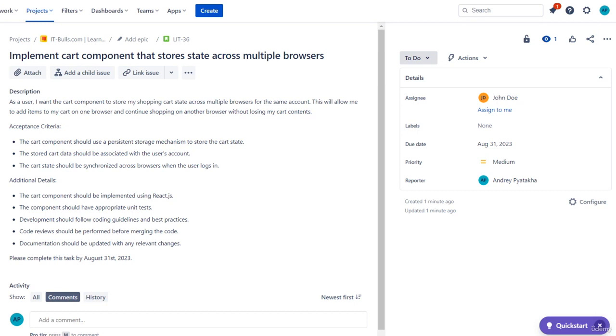Of course, you can verify the estimation with the team and change it later if you wish, but again, this will boost your productivity. You can also ask the bot that uses GPT capabilities to calculate the average team's velocity and prepare the scope of the next sprint based on the estimated tickets from the backlog.